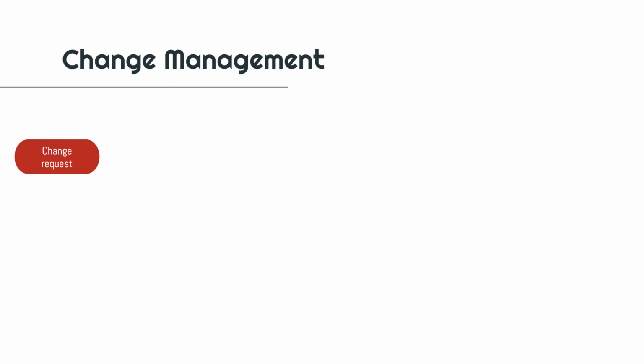Two, change requests could be initiated by anyone involved in the project. It could be initiated by your team members, by yourself as a project manager, by the sponsor, by a stakeholder, by anyone. So anyone involved in the project or who is going to be impacted by the project could initiate a change request.